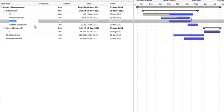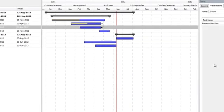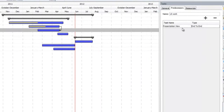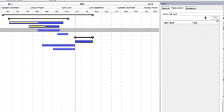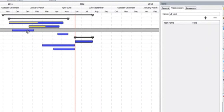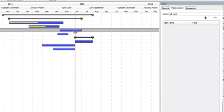This task here is showing some of the things you can do with predecessors. I'll just take this predecessor off there. So without a predecessor, a task is free to move wherever it wants.